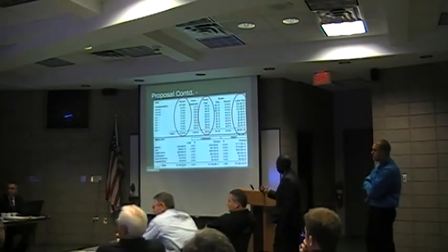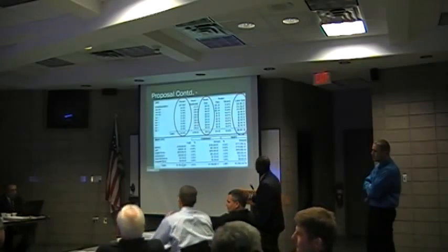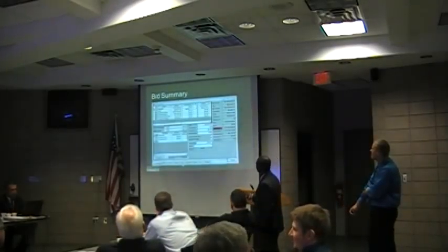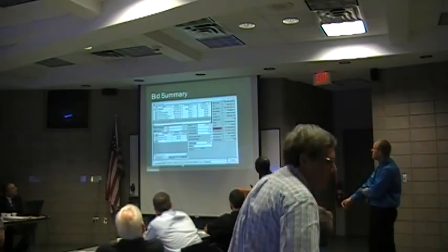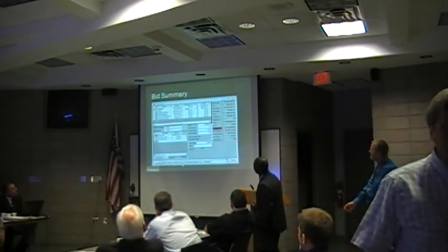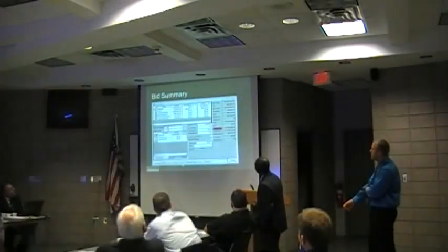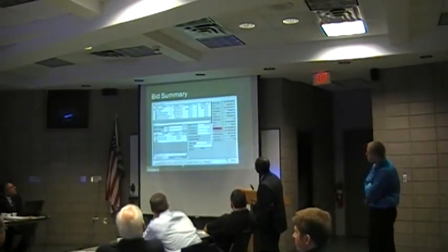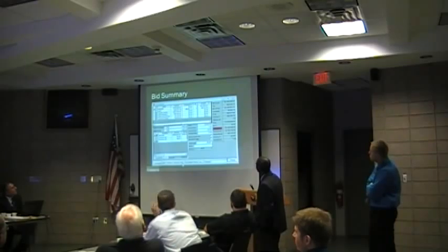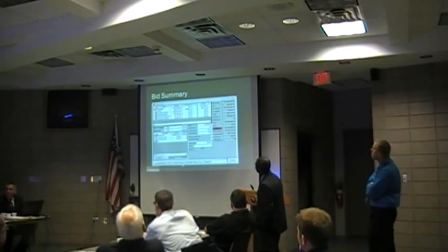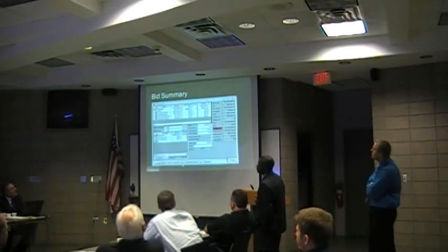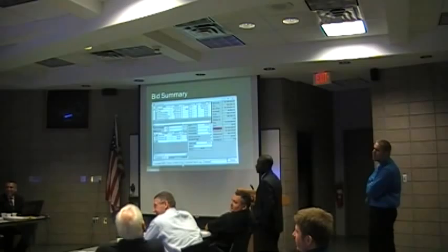If you go back to your bid summary, I think it's maybe the last. It shows total return of 4.81, primarily because you don't mark up supplier quotes, subcontractors, and direct job expense. Just a thought, you need to have more than 4.81 return in your jobs. It should be low, but you get a lot of work done.